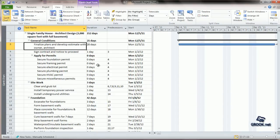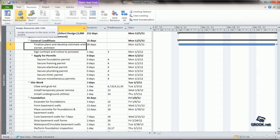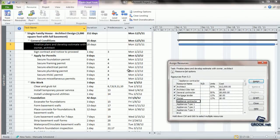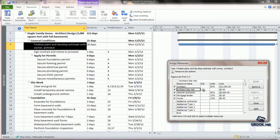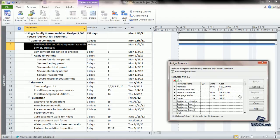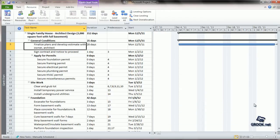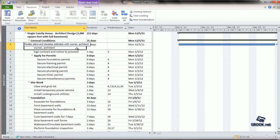Now, let us see how we add a cost to this particular resource. Let us go to resource, assign resources, and here where we see Architect Site Visit, let us say we want to add $75 to this. We can add that value and close. That particular cost is associated with this resource assigned to this task.